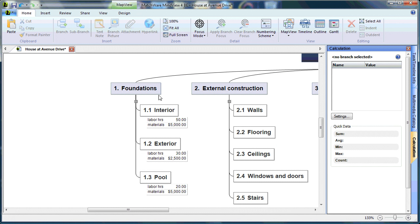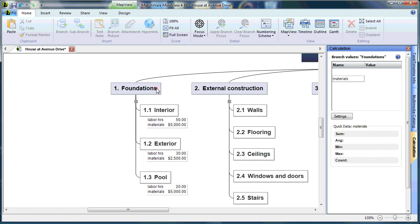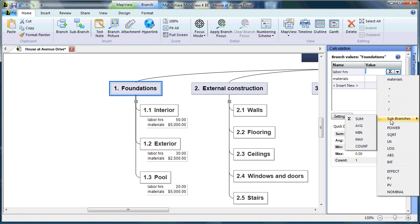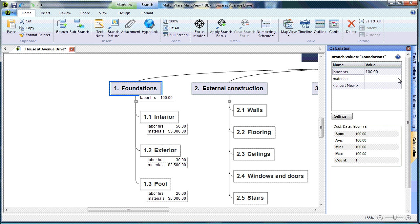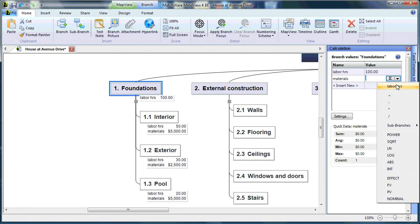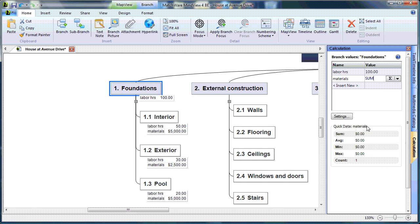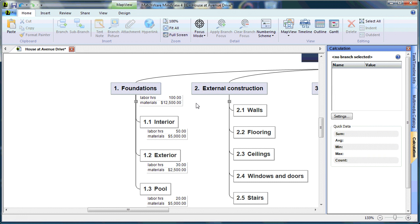If I'd like to do a running total on my main stage level, I can simply choose the main stage, select the desired value — for instance, Labor Hours — select the drop-down arrow, choose Sub-Branches, and choose to total or sum all sub-branches. It will take the values for Labor Hours of Interior, Exterior, and Pool, and display that on the Foundations branch. I can follow the same steps to create a sum for Materials, giving Foundation a total of 100 Labor Hours and $12,500 in Materials.